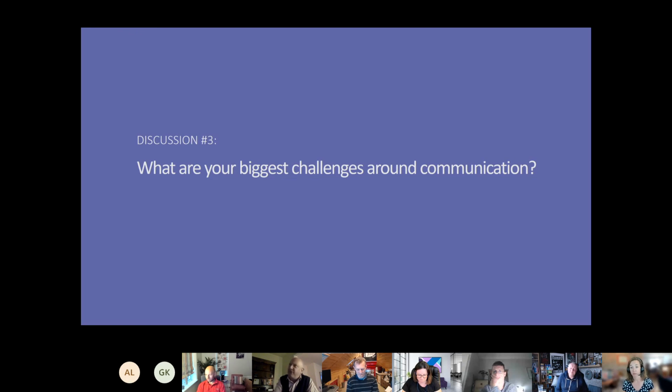We moved to a team meeting twice a day, once first thing in the morning, just to get people focused on what they were going to achieve in the day. Then another one just after lunch to say, actually, I'm supposed to achieve this by 5 o'clock, but I'm struggling with X, Y, and Z. That allows people to come in and give that person a hand, essentially taking the problems away from them.